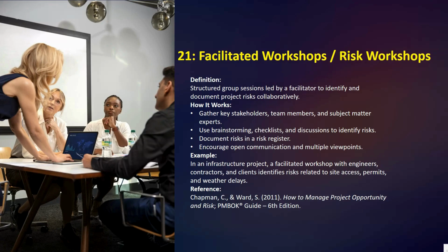Under definition, you can read: a structured group session led by the facilitator to identify and document project risk collaboratively. How it works: gather key stakeholders, team members, and subject matter experts. Use brainstorming, checklists, and discussions to identify risk, then document risk in a risk register, then encourage open communication and multiple viewpoints.